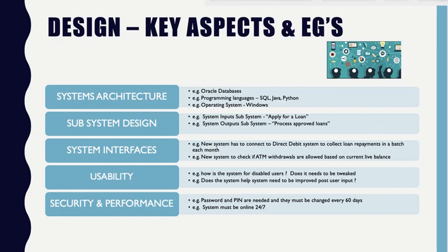The next aspect we will consider is subsystems design. So it's commonplace to divide the systems into a number of discrete, manageable functions called subsystems. This allows the project to be managed more easily, and it allows for multiple development and testing teams to work in parallel later on. So these subsystems are derived from the process models and documentation created at the systems analysis stage.